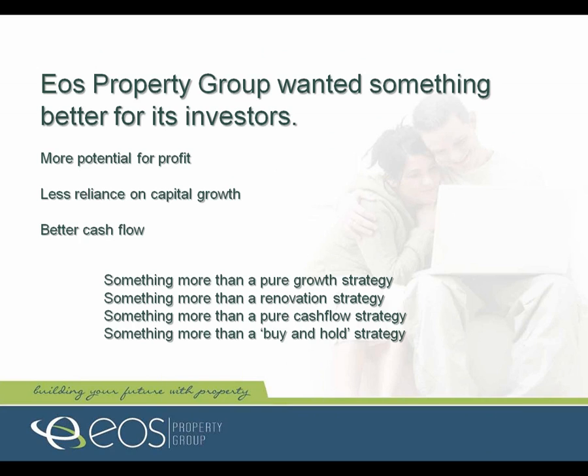Tony asks, are there any sunset clauses included in the contract? Not from our point of view. The contract with the builders is a fixed time, and he pays liquidated damages if he goes over time. There is, of course, in all building contracts, some room for variations, inclement weather, those sort of things that are outside the builder's control. But if he goes a day over, he starts paying us liquidated damages.